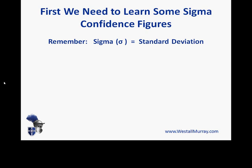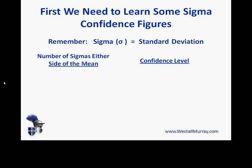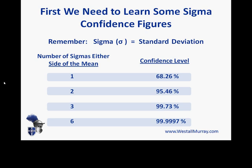Remember that sigma is standard deviation, denoted by the Greek letter lowercase sigma. For various numbers of sigmas either side of the mean, we have certain confidence levels. To hit a target one sigma either side of the mean, we have only a 68.26% confidence. A larger target of two sigmas either side gives 95.46% confidence. Three sigmas either side gives 99.73% confidence. And six sigmas either side gives 99.9997% confidence — almost certain. You need to memorize these for the exam.